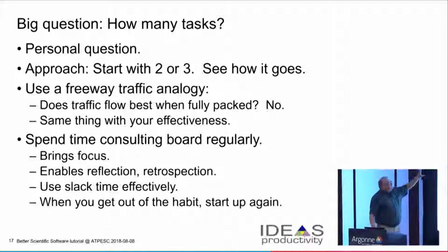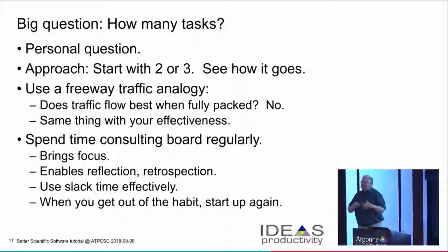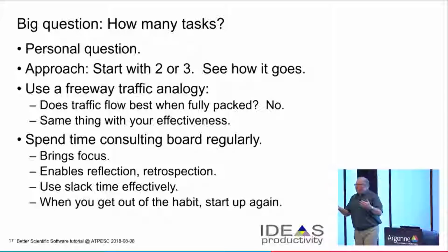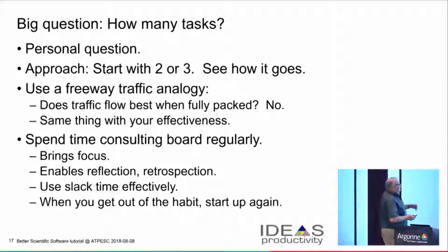But if you do this thoughtfully, you'll figure out where you sit on this, and you can do this with your team and figure out how many things your project team can effectively work on. And you can keep track of your board and track your progress. There are ideas about the velocity of your project, how many issues you're retiring into the done column over time, and things like that. And so you can get a feel for some of these things.